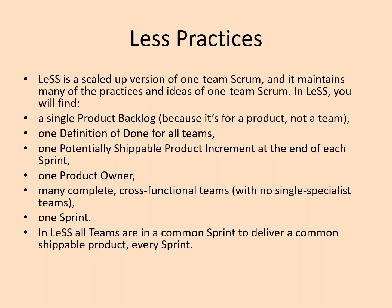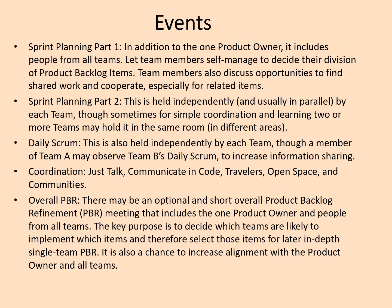There are many complete cross-functional teams with no single specialist team, and one sprint — every team works on one sprint. In LeSS, all teams are in a common sprint to deliver a common shippable product every sprint. Those are the LeSS practices. The first event is Sprint Planning Part One.